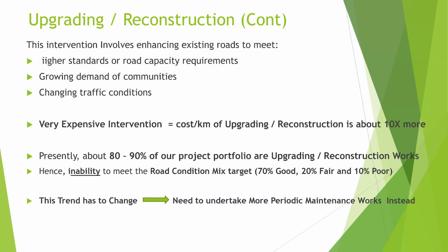Now, when you have these, then upgrading becomes very, very critical. It is a very expensive intervention. The cost per kilometer is very, very high. Presently, we are having about 80 to 90% of our project portfolio being upgrading or reconstruction. Because of that, we are not able to meet our road condition mix target, which is our 70-20-10. We need to change this trend to make sure we undertake more periodic maintenance activities.